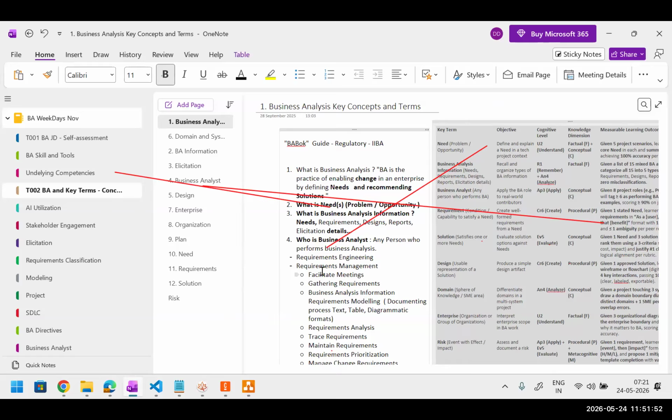So, Jasmine, as DP rightly said, understanding the environment is important. As a business analyst, you should understand how you're going to operate, the ways of working. You know that the requirements need to be split into 2 weeks of fine-tuned small slices so that the team can complete within the 2 weeks. So you need to wear close to a product owner hat. Jasmine, you already worked as a Scrum Master and RTE, so this is the kind of role we are talking about.